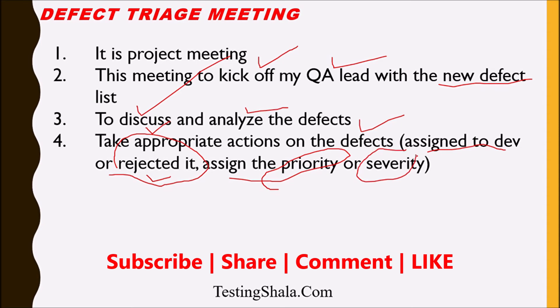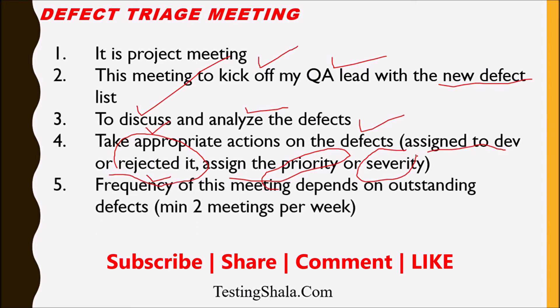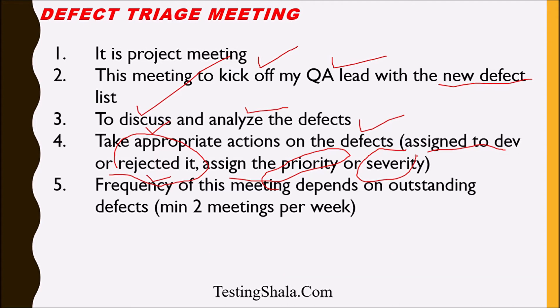The frequency of this meeting depends on the outstanding defects. If you have a large pile of outstanding defects, you would likely have daily or alternate-day triage meetings per week. If you have fewer defects, you can hold this meeting just once a week.